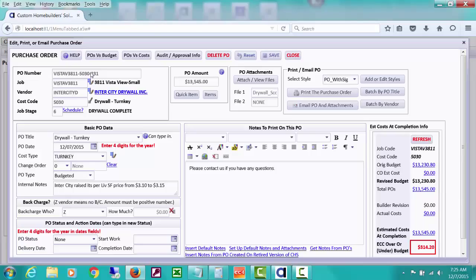One suggestion I could make is that if out in the field and you're requiring POs for everything and somebody needs to give a PO number to somebody, maybe they just give the job code and the cost code, and then a 999, and then once they turn it in or call it in, you'll be making a PO for it, and it'll be just a little bit different, but if they use that PO number on it, you'll know it's one they assigned in the field.